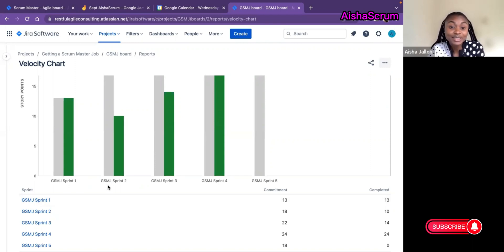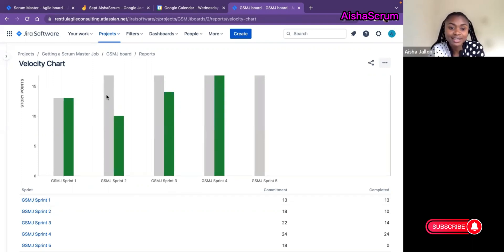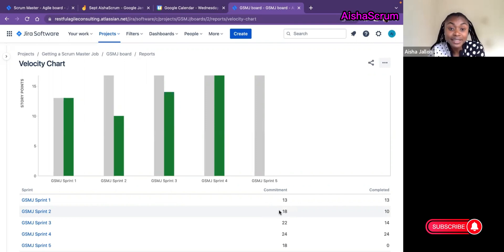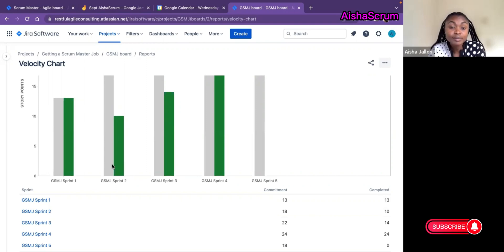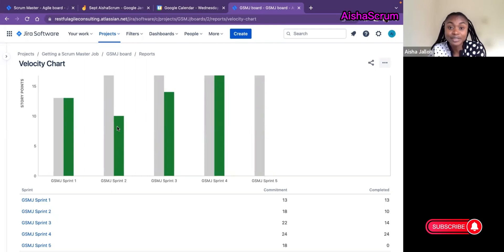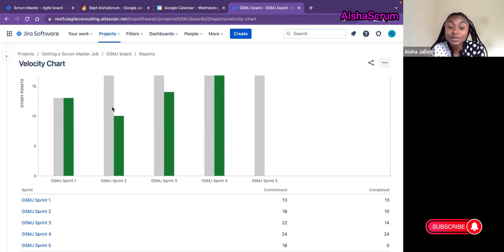In Sprint 2, the team committed to 18 story points. At the bottom here you can see it says 18 commitment. In the beginning of the sprint when we hit start after their whole sprint planning, the team agreed and committed to complete 18 story points for the sprint. But at the end of the sprint when the sprint was actually closed, the team completed only 10. That's why if you notice they had a spillover. There's another way we can interpret it—the team did not complete their commitments, they didn't meet their sprint goal. In Sprint 3, the team committed to 22 story points and they completed 14 for the sprint.